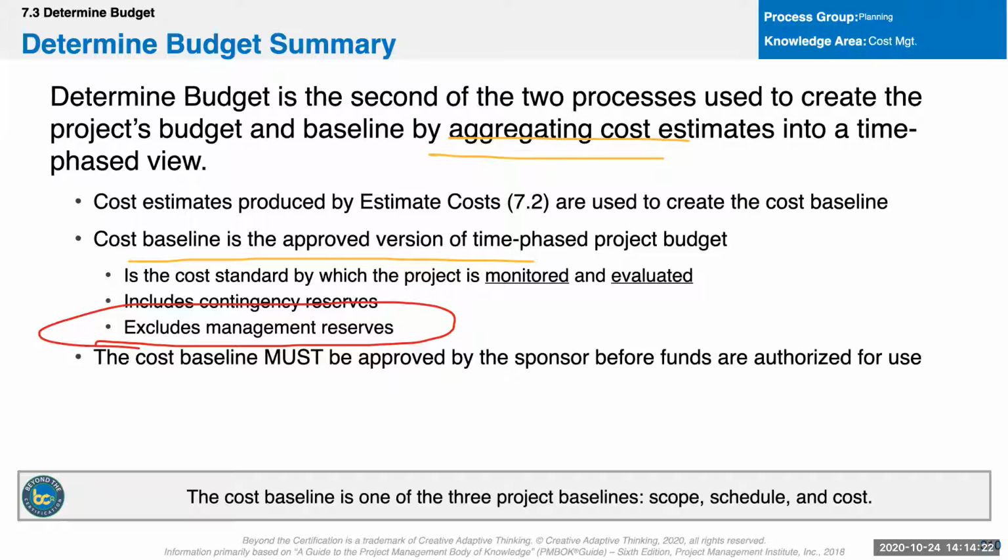All right. So my schedule's for me and how we're going to build it. The schedule that the team needs to adhere to, that's the baseline. That's for the company. That's deliverable based, not necessarily activity based. Maybe that helps. The deliverable based schedule is more of the schedule baseline: when will we get stuff done? An activity based schedule is more of the project schedule, and that's what your team members use. Got it.